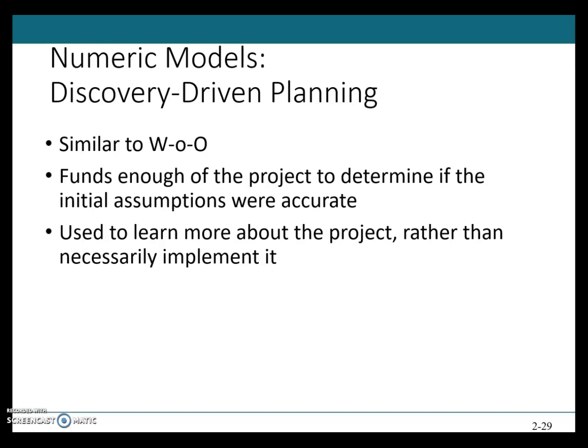So if a critical assumption proves to be invalid, management must rethink its strategy and the project. So this process is not just a one-time exercise. However, the process continues as the stages of the project are executed, so that at any point in the project, management can step in and terminate it if conditions change and the project looks less promising.